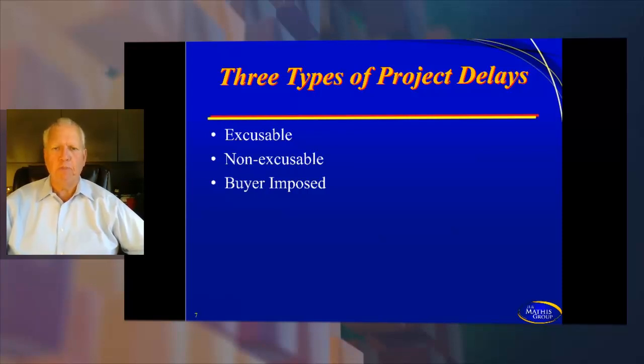And then you could also have buyer imposed. Buyer imposed means that the customer has put stipulations. For an example, you're working on a project and all of a sudden something drastic happens at that company. Many years ago, we were at an organization, and 2 people in the organization were killed in a car crash, and they were very high up in the organization. And so everything kind of went on hold for about 10 days while they were reshuffling, trying to figure out what they were going to do, because these were high-profile people, very much involved in a lot of different projects, and these individuals were just flat-out good people. And so the people were reacting and grieving over the loss of this. So the buyer imposed 10 days where the projects, everything just kind of stopped, and they let people sort through it so that within 10 days, they were able to come back and get going again. But it did delay the project, so that was buyer imposed.